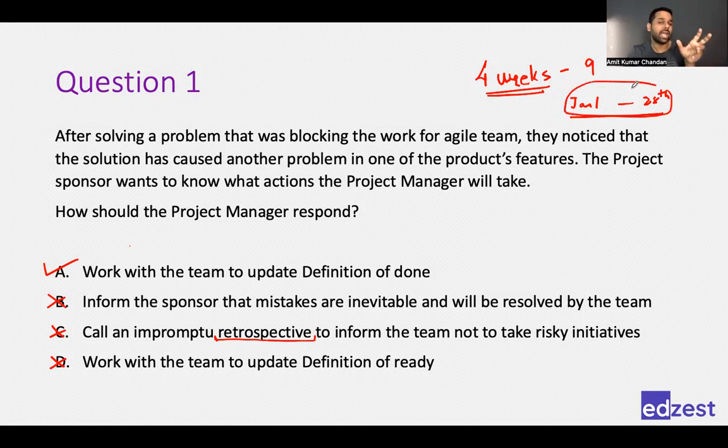So the team can decide in the beginning itself that even though our iteration duration is of 4 weeks, we will meet every 2 weeks for a retrospective. That the team can decide. Second is when you are doing a lot of work, let's say, for example, you did a very complex user story, even if your duration is 2 weeks. Now, this is the second scenario, right? Your iteration duration of 2 weeks, you did a lot of work, a very complex user story. And there are so many things to learn from it.